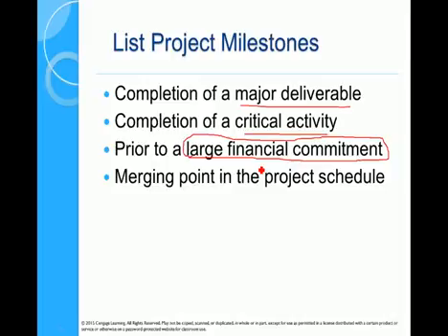The other thing is that you can think about milestones in the project when parts of the project sequence come together. For example, if you're doing a prefabrication of a part of an ore crusher, which is done in Henderson or here in Fremantle, and then you're importing the screen for this ore crusher, and you're importing that from Thailand. When those two parts are finished and they come together and are added to the entire ore crusher, when two major components come together, or a point in your schedule, a merging point in your schedule, that can also be milestones. Let's just make this number 1. That means that when you've thought about this project, you thought about what are the key deliverables, the major deliverables. They need to be milestones in your project.